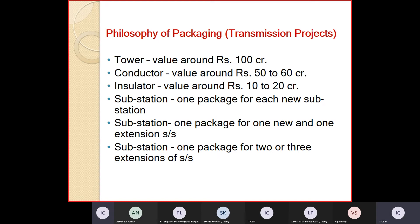In Power Grid, for example, 100 crores may be one tower package, another 100 crores another package. Not only financial and technical capability, but also we have project execution time. If you give everything to one party, then execution time will be lengthy. But of course, with one party there is less coordination; with more packages, the employer has to coordinate more and the employer has to have requisite expertise.